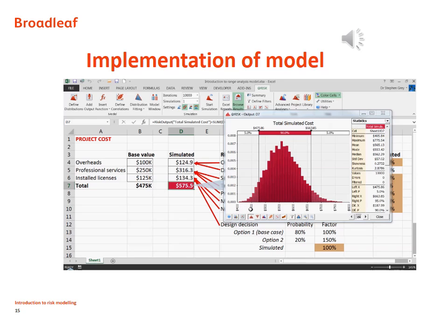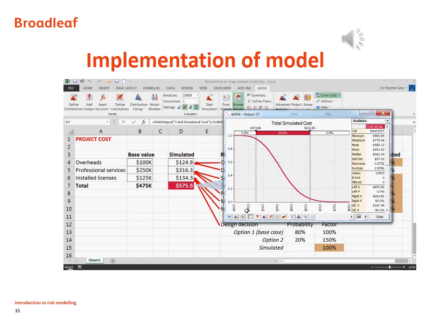Now sometimes it's easier to decide how much contingency you want to add on to that base cost to give yourself a reasonable target by looking at the cumulative distribution, and this shows the risk of exceeding any particular value in this range. So if you want a target that has about a 1 in 10 chance of being exceeded, then you would be aiming for 640,000 roughly. If you wanted to be a bit more adventurous and wanted a target that had about a 1 in 5 chance of being exceeded, you could get away with, say, $615,000. But if anybody was trying to do this for the initial estimate with no contingency, they'd be more than likely, a lot more than likely, going to exceed their target.